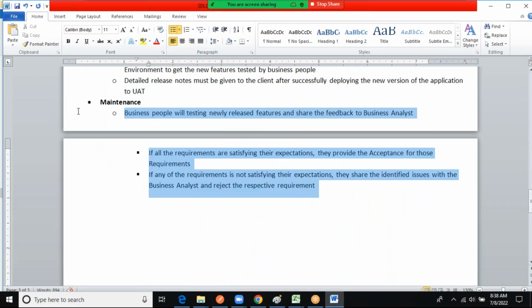In this way, you will be providing support to the client in the maintenance phase. Once you develop the complete product in 2 or 3 years and the final deployment is also done, it doesn't mean that the client will break the contract immediately with the vendor. They keep 6 months or 1 year of maintenance phase.